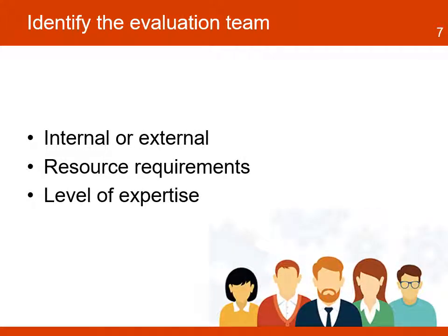The identification of the evaluation team. In this step, the project manager, with assistance from the M&A unit, will define if the evaluation will be internal, external, or a combination of both. Identify the resource requirements and the level of expertise that is required from evaluators to conduct the evaluation.